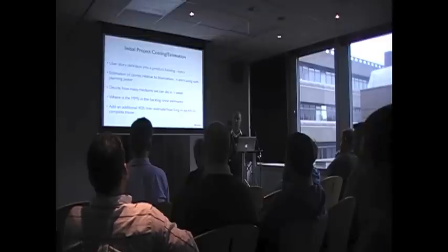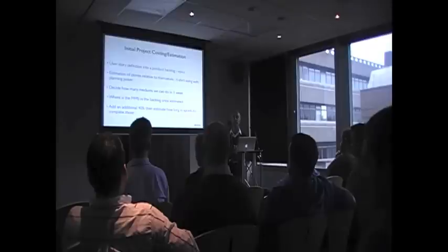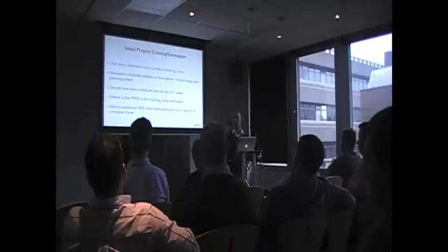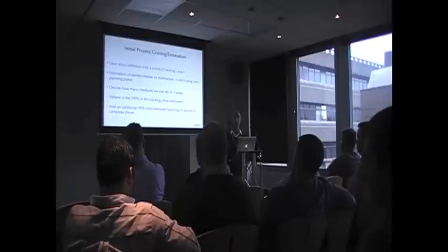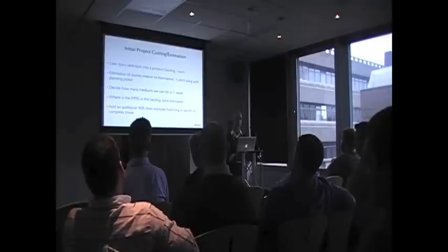So pick a range of medium as the one that you would start with, because different projects have different values. A medium on one project may be different to a medium on another project. If you've got some big data integration service, there may be different relative values for a small, medium, and large. And decide how many mediums you can actually do in a week. For instance, you could maybe do 3 mediums in a week. So you could build a news section and 2 other medium sections in a week. You could maybe do 1 large in a week if it's some big CRM integration, or you could do 4 or 5 smalls. So it's just taking an estimate on that.